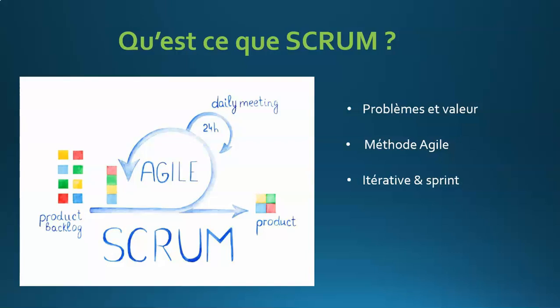We see the notion of sprint. We will talk about it and come back to it later. Keep in mind that a sprint is a small box in which something is delivered. In Agile, more specifically in Scrum, we talk about a sprint which is generally 2 weeks and can go up to 4 weeks. Most Scrum teams will use a 2-week period. Fast and continuous improvement. Effectively, you deliver and progressively improve what you deliver.